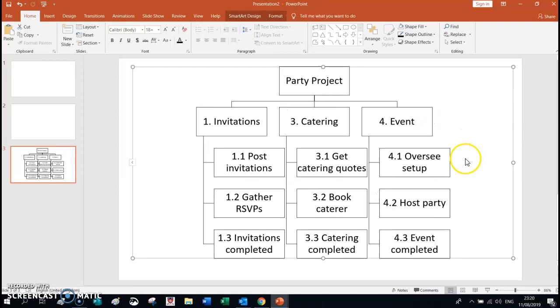And there's my work breakdown structure, but it's not 100% correct. Remember that to get your full marks, you need to ensure that your activities or your tasks are not in boxes, only your deliverables. So I'm just clicking on the lines around the boxes I don't want to have. I'm holding Control so I can do multiple clicks at once. Could do it individually.